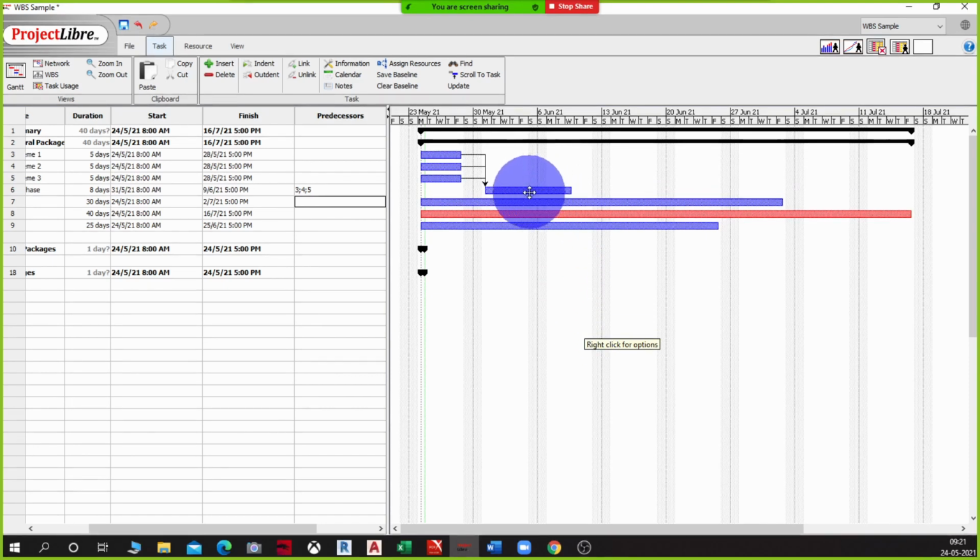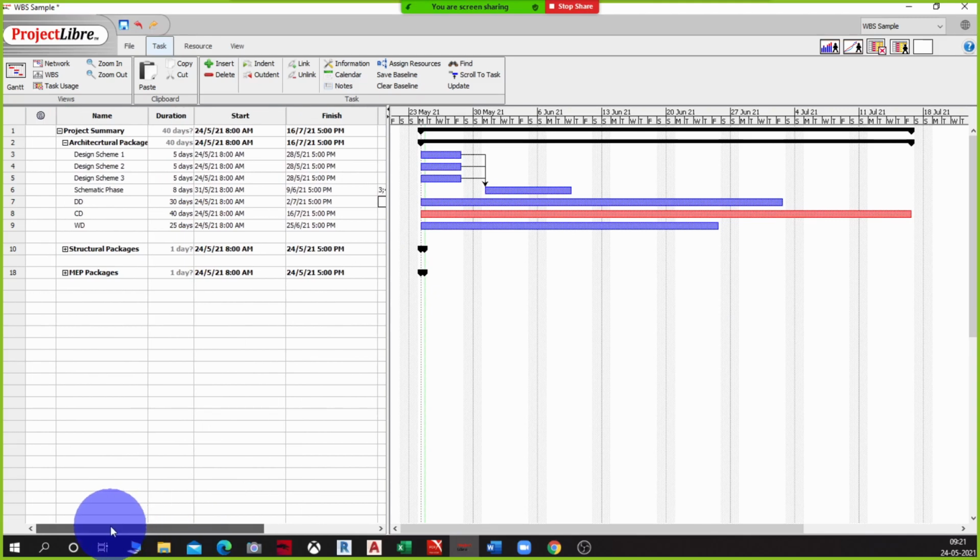Yeah, you can come into any particular task, drag and create the relation with the other one. This is the graphical way of connecting it. This is a way of when you're probably deciding on your planning. So you are looking at these different activities and you're deciding, okay, this needs to finish for me to start this. So that's what I'm doing now.